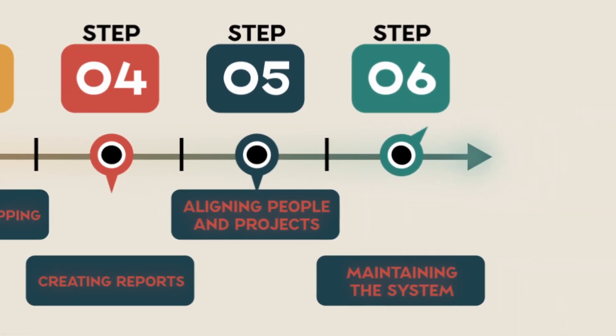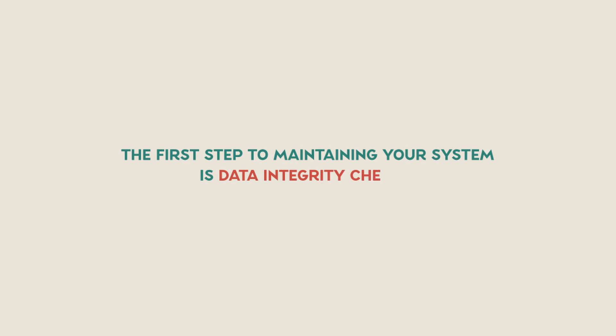Let's move into step six: maintaining your portfolio schedule system. You've nailed the road show, set up portfolio reporting, and gotten your cadence down. The thing you need to focus on now is how you're going to maintain that system month in and month out — as new projects start and old projects finish. The first step to maintaining your system is data integrity checks. You can set up reports that will highlight whether the required milestones are there, whether the coding is in place, and you can look for null values and provide feedback to the team across any data or metric you want to track.